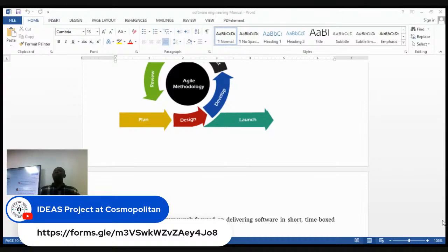That's phase one of the understanding. Functional requirement is the one that the owner of the software tells you that they want. Because when you develop the software, that is their yardstick to measure it. I told you that I want software that will do this, do this, do this. Even if you do all the things in the world and that software is not doing that thing the person said, you've not done the software for that person. That's why you call it functional requirement. Now, non-functional requirements are those ones they didn't tell you, but it's important.